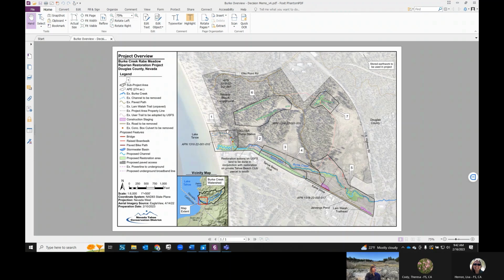And then in late fall, we'll have to come back and tie in Subproject Area 1, remove this road to the sewer pump station and activate the new channel after a full summer of revegetation. And that would occur in September or as early as September 2023, or it could occur in September 2024 if needed.